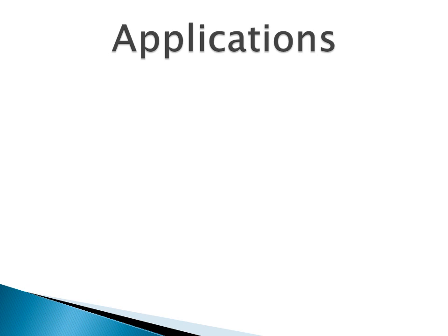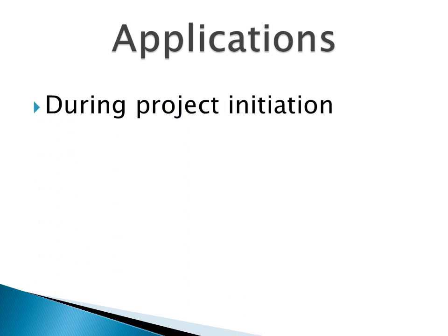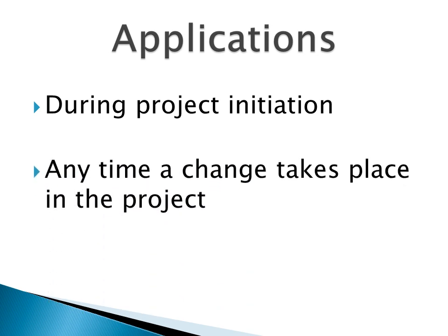Assumption and constraint analysis is used during project initiation and any time a change takes place in a project. Each time a change occurs, the assumptions and constraints should be reviewed to ensure that they all still hold true. They should also be reviewed when decisions are being made regarding the action to take to allow for informed decision making.